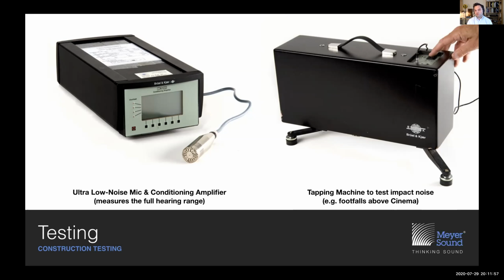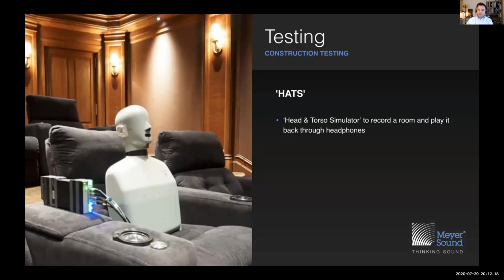All the acoustics are installed, speakers are installed, and what we're doing at black box testing is verifying that the room acoustics are on track to achieving what we're looking for. And if we need to, we'll change some of those acoustics. We might swap out a diffuser for another diffuser in a specific location, or change absorption for another type, or slightly change the orientation of a passive acoustic product.